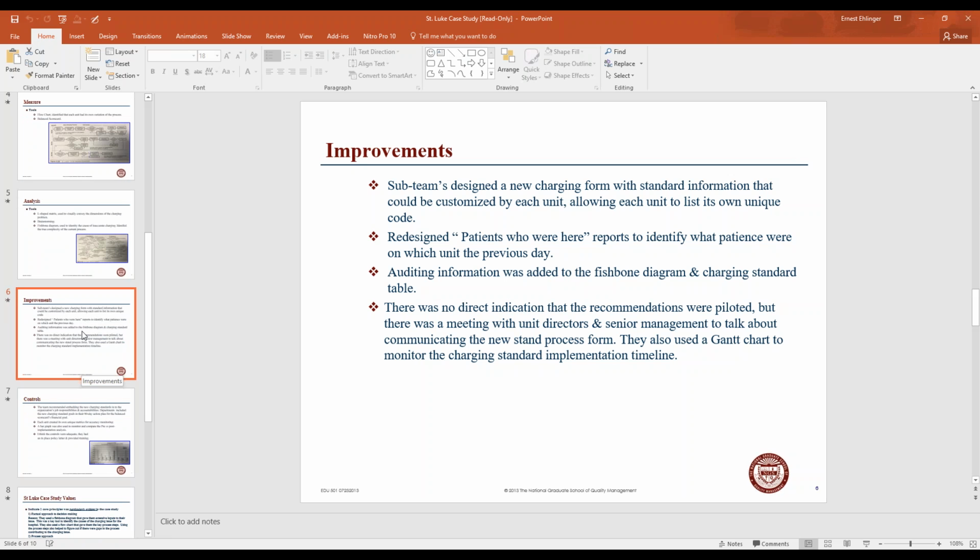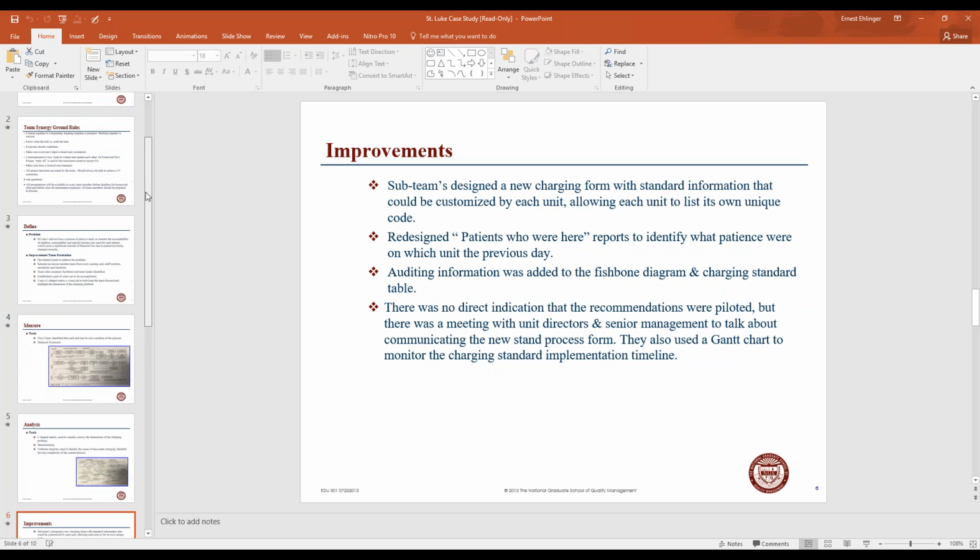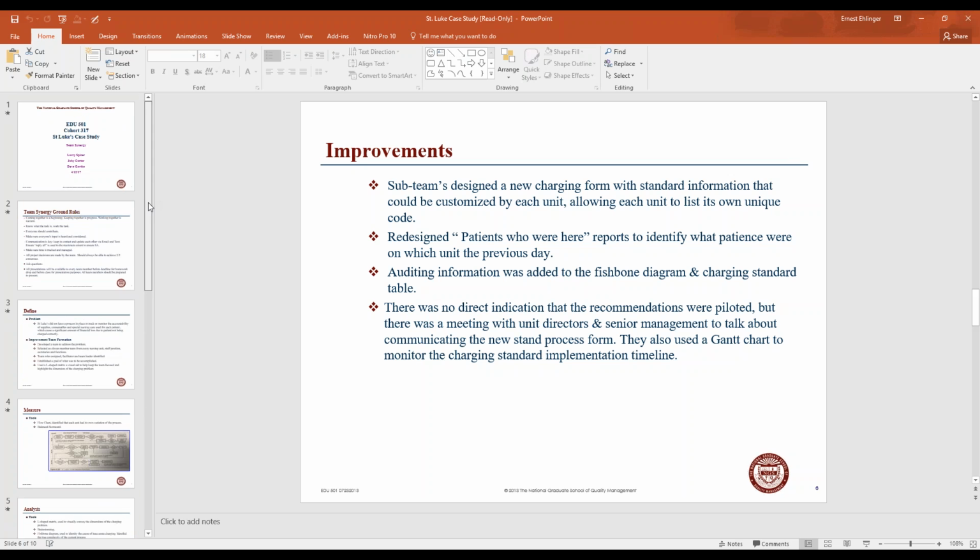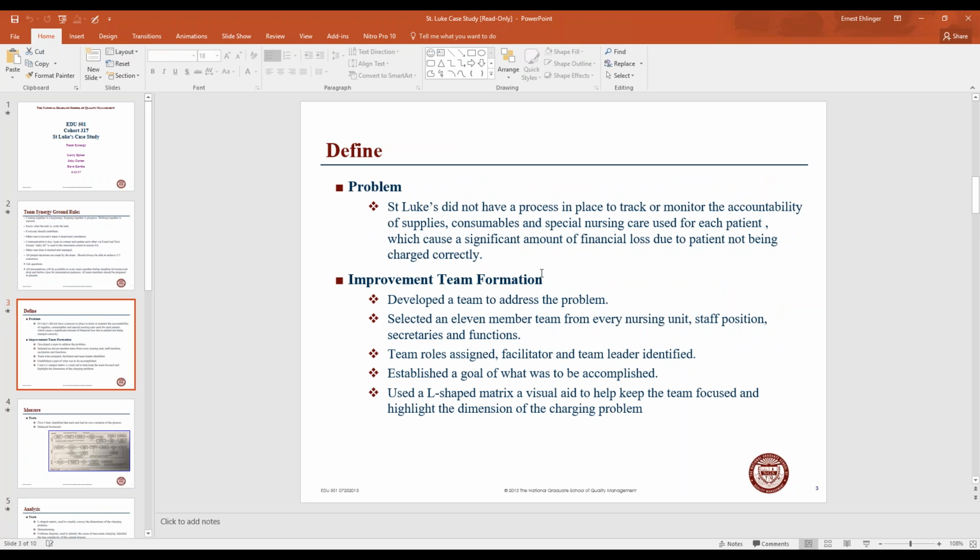And let's take a look at some of your recommendations. They went through, identified a current state, collected data, went through the analysis of that data, provided recommendations, and as they went through this process, they identified the improvements here. And one of the things I want you to be aware of, when we start talking about your MVPs, is that if you look back at this, the very specific things they're recommending to improve should not appear at all at this phase in your problem statement.